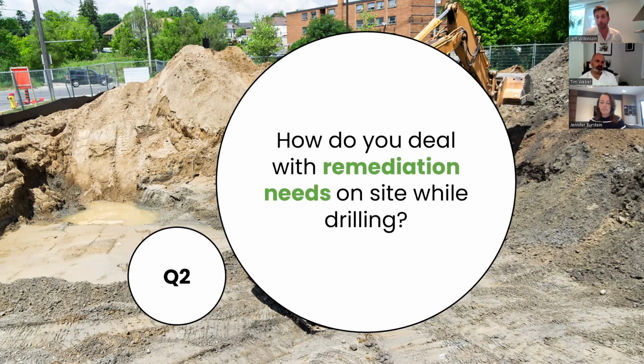But we've dealt with it where you have to deal with those spoils if they are contaminated. But ideally, if you can get the demolition done, site cleared, and the geothermal boreholes in after the remediation is done, that's ideal if you can advance it that far. So that's been my experience.